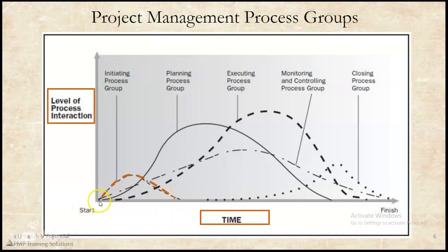This is the initiating process group. Before initiation is completed, we start the planning. Before planning is completed, we start executing. Then monitoring and controlling actually happens from the start of the project to the end of the project.